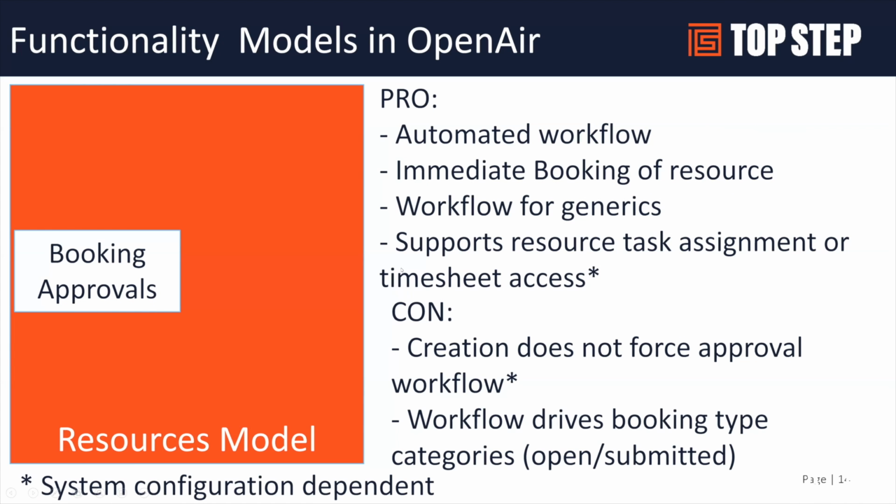So we talked about some of the pros and cons. All of these models, all these features support the whole task assignment and timesheet access that we talked about earlier. One of the cons to be aware of is that the creation does not force approval workflow, meaning they can get stuck in different parts where, just like a timesheet gets submitted or rejected, no one takes further action.